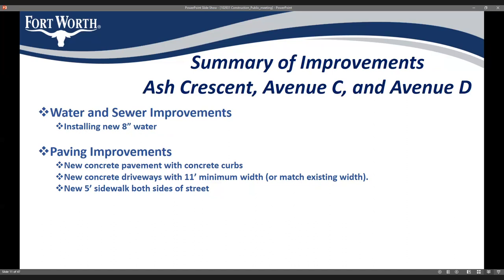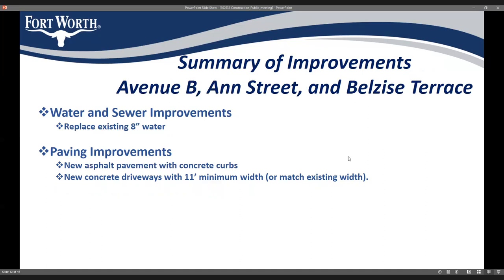Other concrete streets will also receive concrete pavement with integrated concrete curbs, with the same driveway standards — 11 foot minimum or matching your existing width — and those streets are getting sidewalk on both sides. For Avenue B, Belize, and Bell Terrace, we'll be replacing the 8-inch water line, and these streets will get asphalt pavement with concrete curbs and gutters, with all concrete driveways replaced.